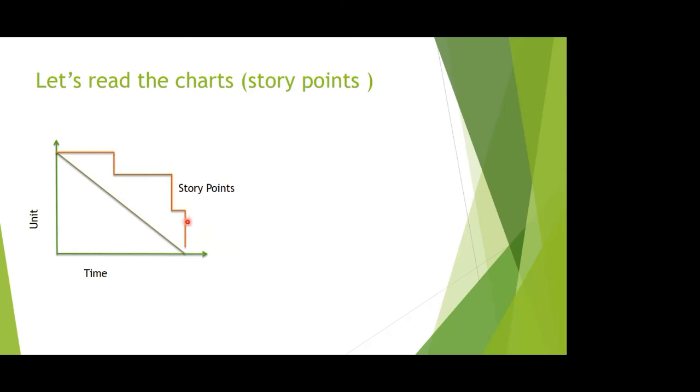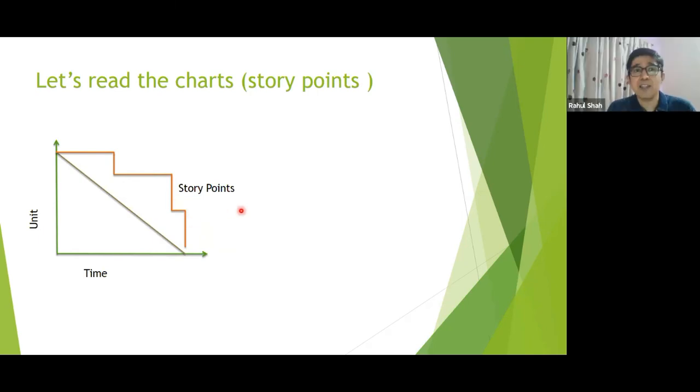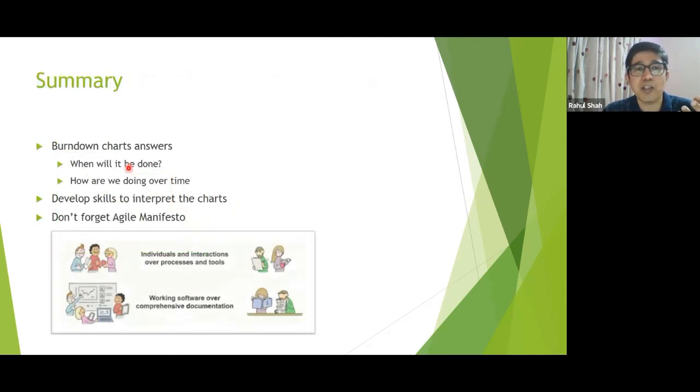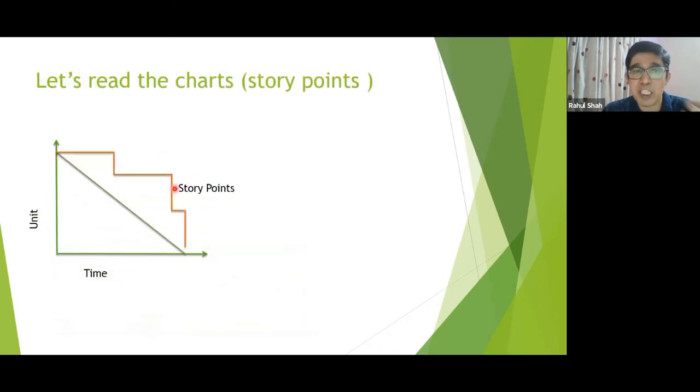Right. Yes, the testing is pending, and the stories are getting closed. They are doing waterfall in the Scrum, in the sprint. They are waiting till the last moment and then give everything to testing and then say, okay, now you close all this. Or there are some defects which are not closed, they are kept open, and that's why this is happening.